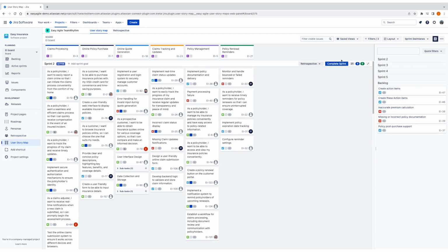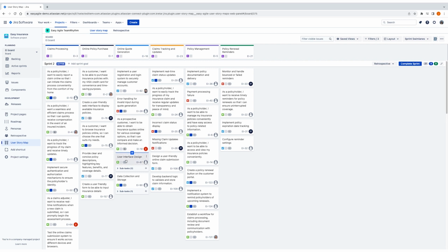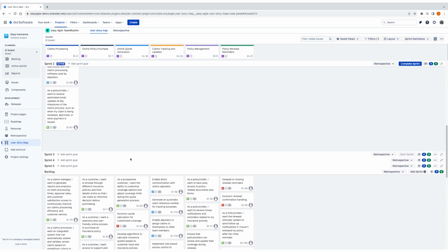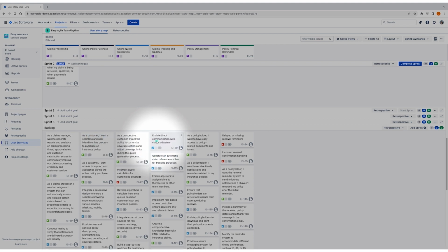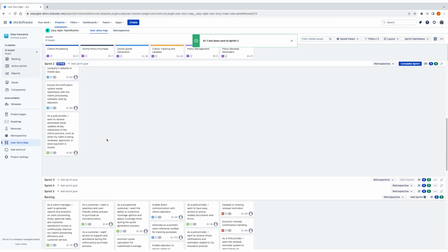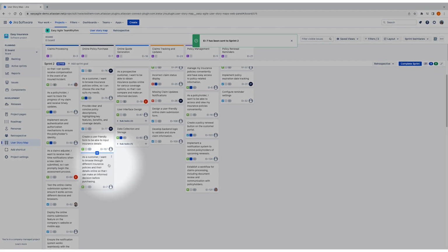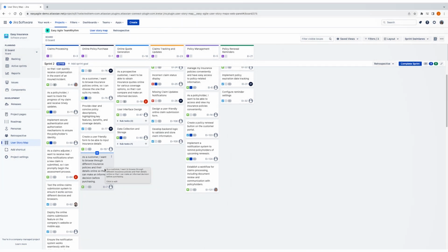For issues already linked to an epic, we can access our backlog from the bottom swim lane of our story map. By clicking on the ellipsis, we can choose to remove an issue from an epic or schedule it into a sprint through quick actions. Quick actions can help us if we have issues scheduled in our sprint that no longer are priority or that we have no capacity for. We can choose to send these issues to another sprint or to the top or bottom of our backlog.